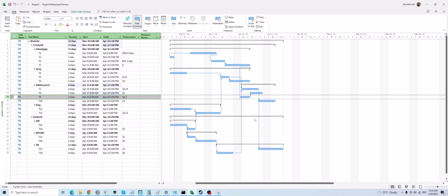You need to use different techniques to try to meet this requirement that this task T9 must complete on this date, and you need to perform your planning based on this constraint. You need to try to reduce the duration of the prerequisite tasks and try to finish the prerequisite of this task before this date, so you can start this one on time and meet the target.